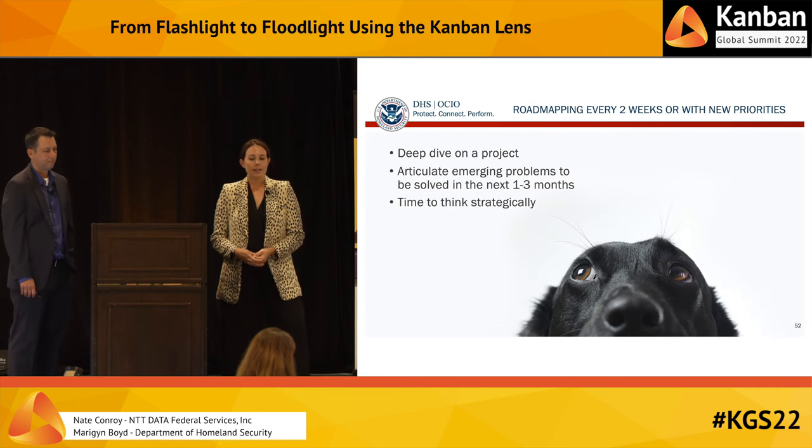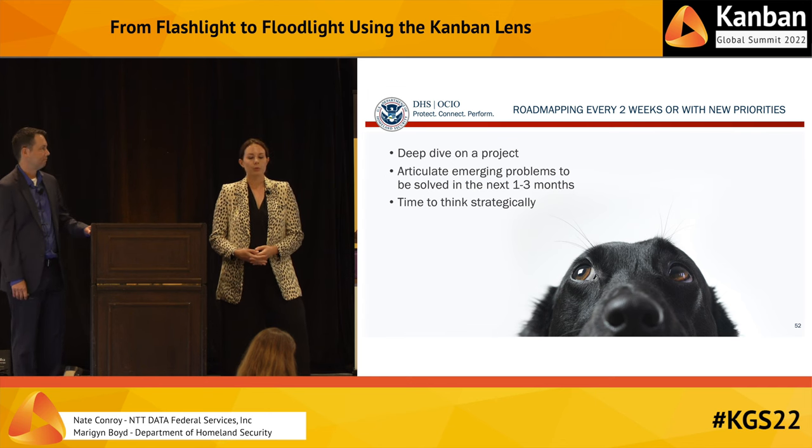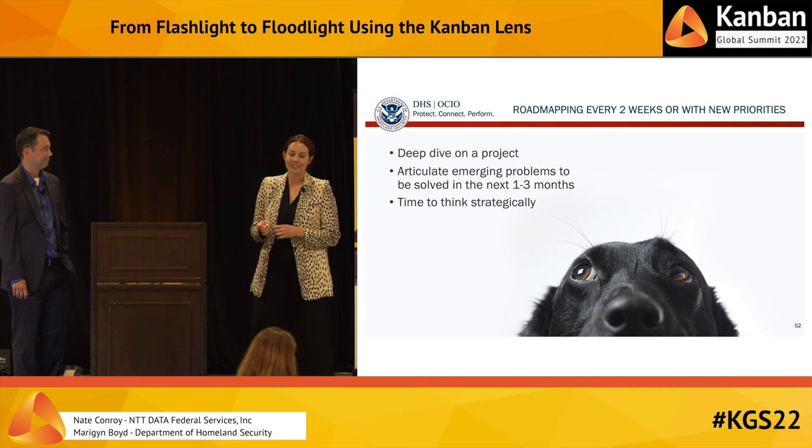Lastly, road mapping. At first, we did roadmap sessions every two weeks, and that was great. But then we found that when we were starting new work, we really needed to add on-demand sessions when starting new epics. This started to help align our work and reduce our lead times. But this is not just about getting teams to do things well internally, this is about coordinating across programs.